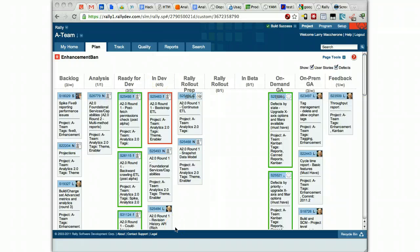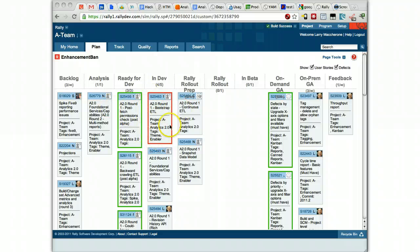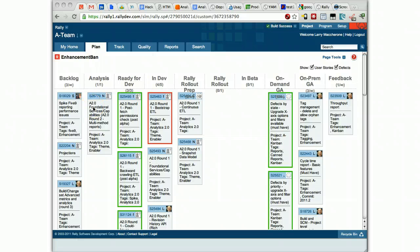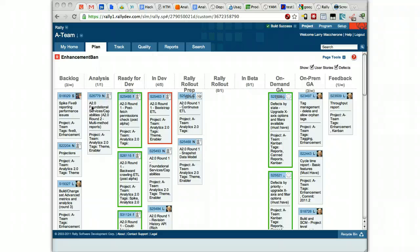So keep in mind, though, that that level that the team's working at is the story level, but this level is the enhancement. So the act of getting something during the analysis phase for the product owner is broken into sub-stories, sometimes with the team's help, to be separate stories that then flow through their more finely grained process at the team level.